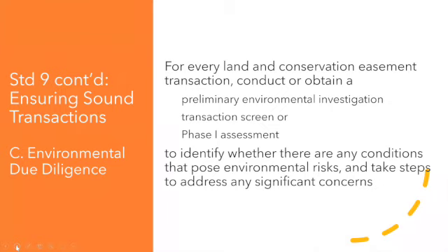So, moving further into sound transactions. An important part of project due diligence is environmental investigation to identify risks, including potential liabilities. The first steps of this might include that site visit that we talked about in Standard 8. During a site visit, it's possible to make a physical inspection of the property and look for any red flags, really. But depending on what you find, you probably won't stop there.